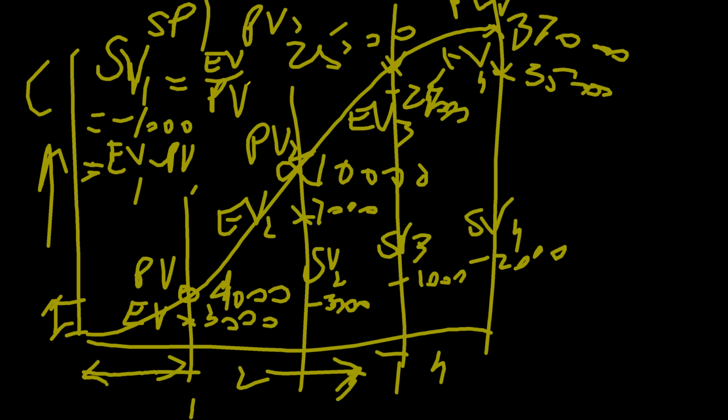So what is the trend establishing? You are worsening. Initially you were 0.75, now you are 0.7, even worse, right? Can you see the trend? This is called trend analysis. My first SPI was 0.75, second SPI was 0.7. So I have worsened by 0.05.